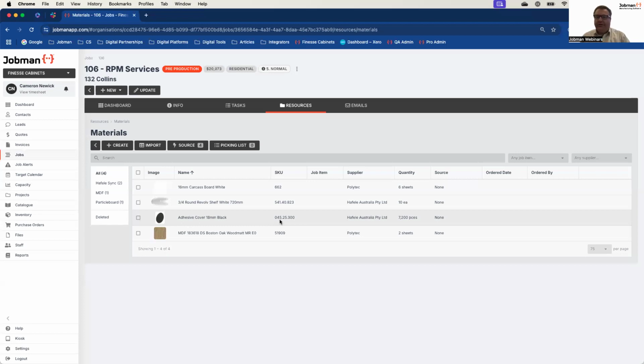But when we actually go to order it, we now need to change that range pricing material into a material we're actually going to physically order from a supplier with an actual SKU, whether it be Metalcorp, or any of the big steel companies that you might buy from. We want to change that item. So for most people, the most efficient way to do that is simply to override the materials in the system and choose from their catalog and choose the correct supplier. It's very easy to do, very fast to filter, very, very quick to change. So that's the most common way people would fill up this list.